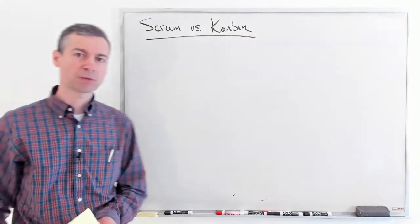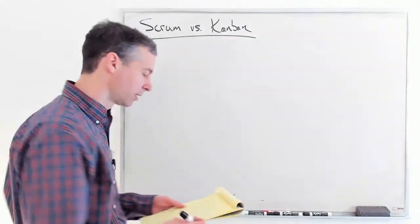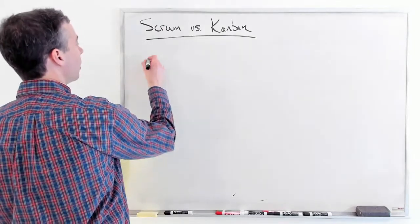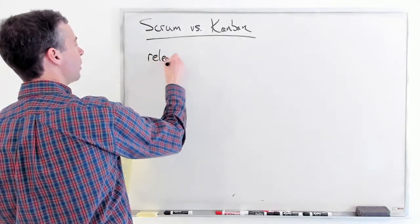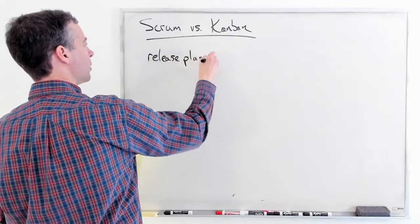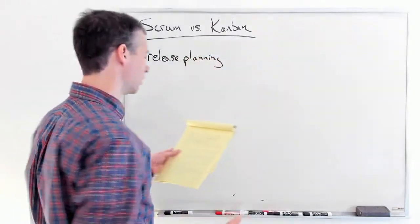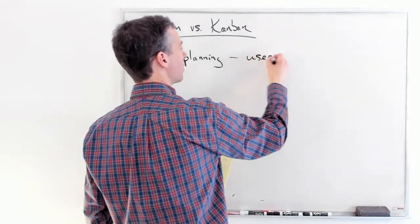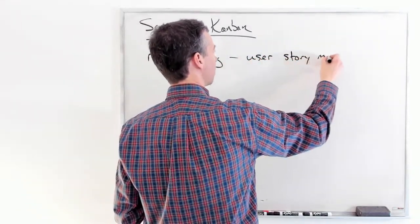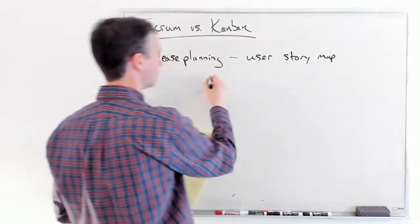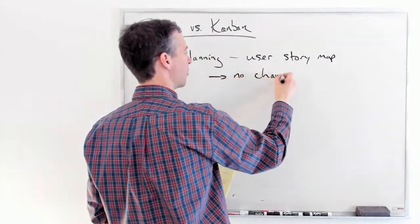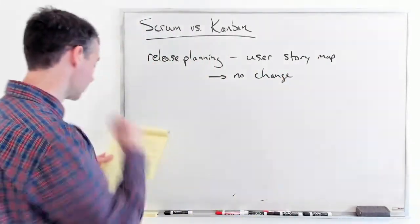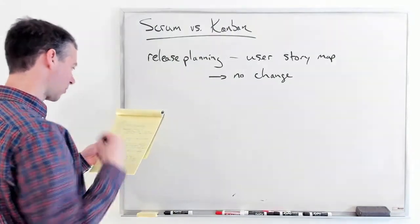Let's talk quickly about some differences between Scrum and Kanban, and let's go through the stages. What about release planning? We figure out this big notion of what we do — things like user story maps and stuff like that. There's no change from Scrum; we do the same things for Kanban. This high-level planning that all projects need stays the same.